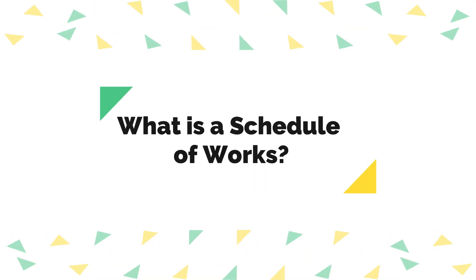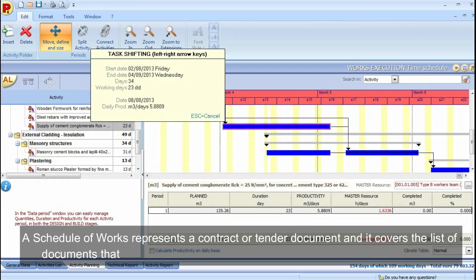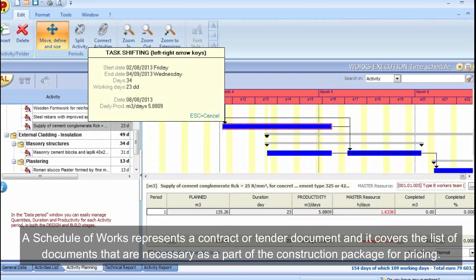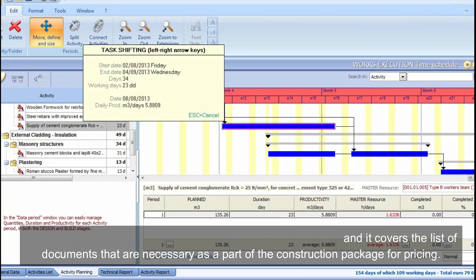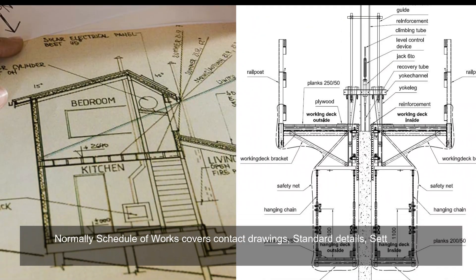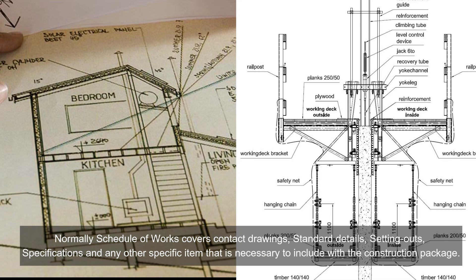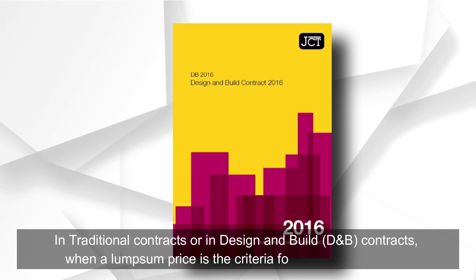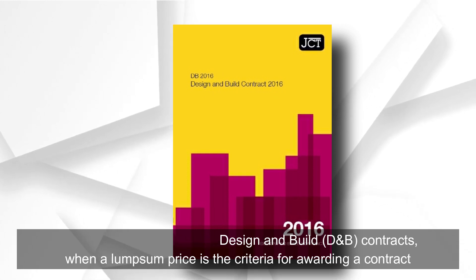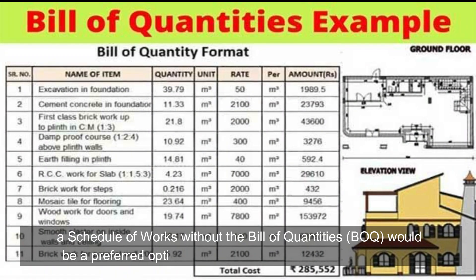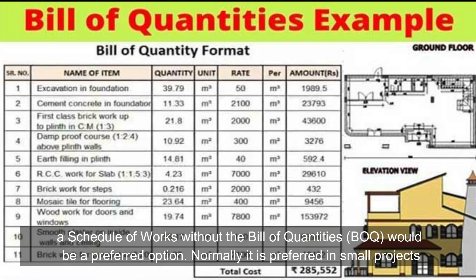A schedule of works represents a contract or tender document. It covers the list of documents necessary as part of the construction package for pricing. Normally, a schedule of works covers contract drawings, standard details, setting out, specifications, and any other specific items necessary to include. In traditional contracts or design and build (D&B) contracts where a lump sum price is the criteria for awarding a contract, a schedule of works without the bill of quantities is a preferred option.